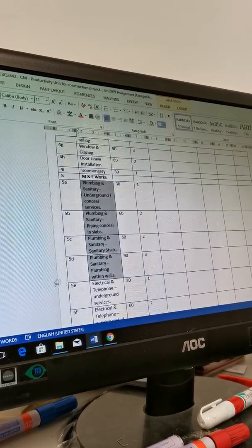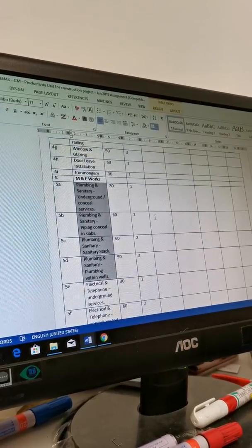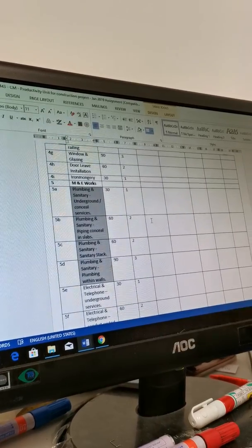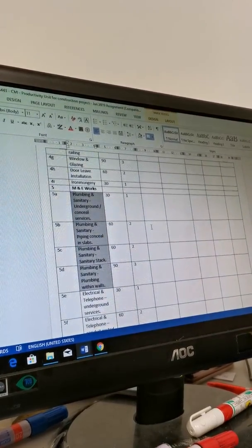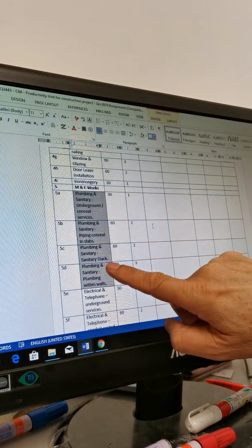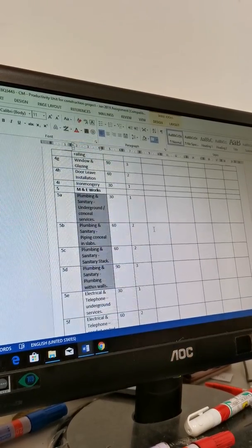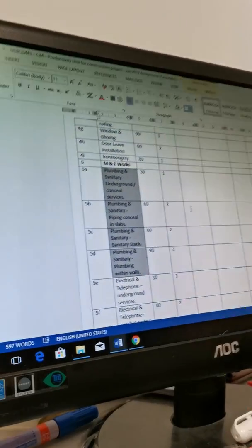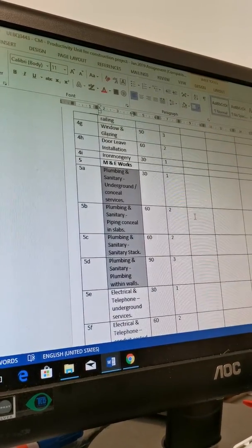Okay? So you can see when you do M&E, it doesn't finish in one go. Wait for the concrete slab to be ready before casting the ground, then only this one starts. And wait for the columns and all this to come out, then only this step will start. After that, before casting the slab, your services, those you want to bury, will be there. After the wall is up, then only the within-wall work will go inside. But these are the times given to them per unit.